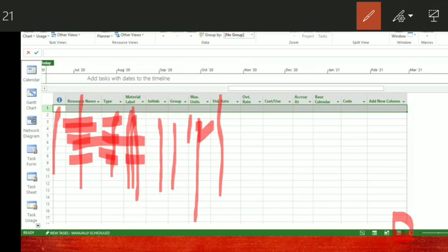The standard rate is the rate that is charged for resource work. For example, a project manager takes around 650 per day. If it is per month, that is different. If it is per day, the way you divide the cost depends on you. The project calculates the default standard rate in hours, but you can specify other increments. For a work resource you can use minutes, days, weeks, months, years, etc.